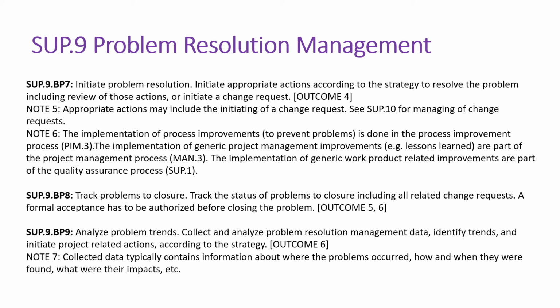So your BP8 talks about track problems to closure. Track the status of the problems to closure, including all related change requests. A formal acceptance has to be authorized before closing the problem. As an outcome of the problem, if you raise a change request, you need to keep the problem in in progress status, and once this particular change request has been closed